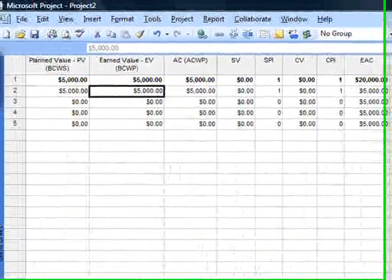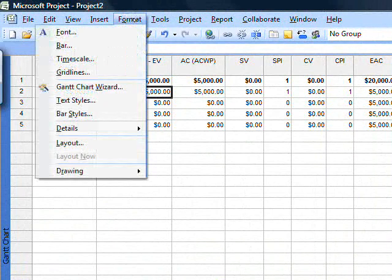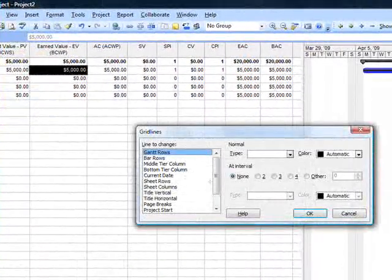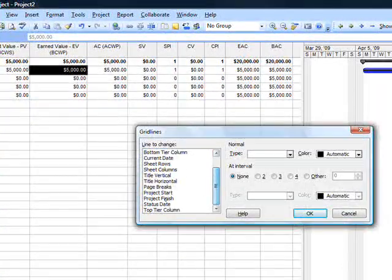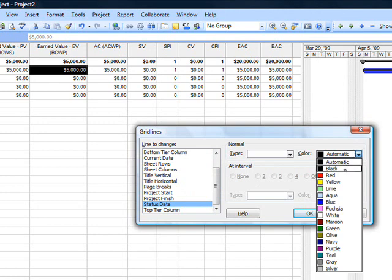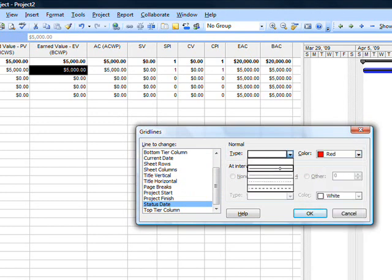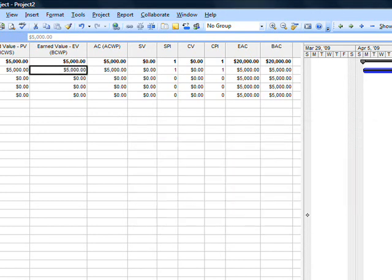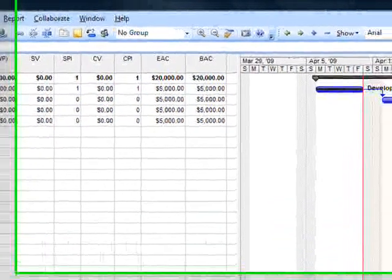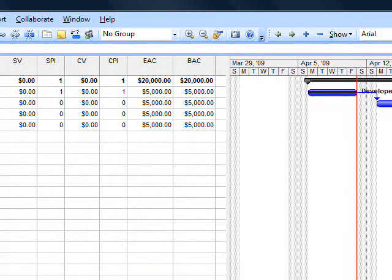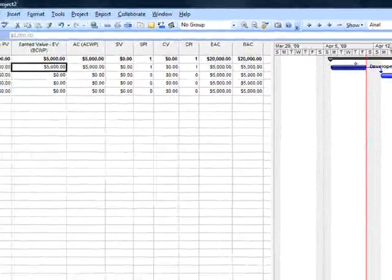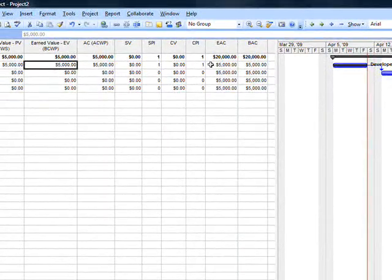I found it's very helpful to go to Format > Gridlines > Status Date and set it to a red solid line. Now I'm beginning to see a picture of earned value. As of this status date on that Friday, these are my earned value figures.